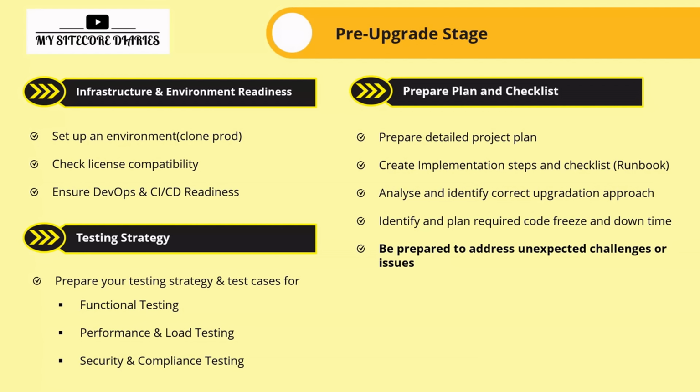And this is very important. Be prepared to address unexpected challenges or issues. Whoever has worked on a migration or upgradation project must have encountered unexpected issues or challenges. It is never going to be straightforward, so be prepared for that. Everything can't be documented with a solution. Things will come up unexpectedly, so keep some time for those things also.